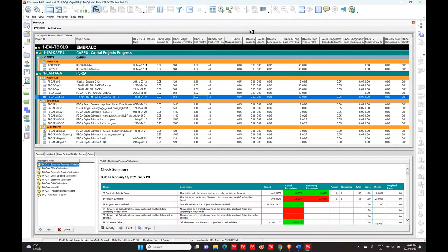That type of scenario. So you control it, because in some projects, using a duration as an example, if I'm working on a turnaround project, a remaining duration of 5 days is probably going to be a big issue. If I'm working on a construction project, a remaining duration of 5 days may not even raise an eyebrow. So you can adjust exactly what you are asking the tool to check for you. That's just something you want to be aware of.